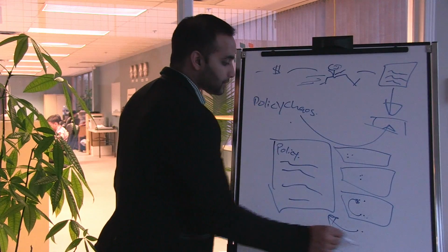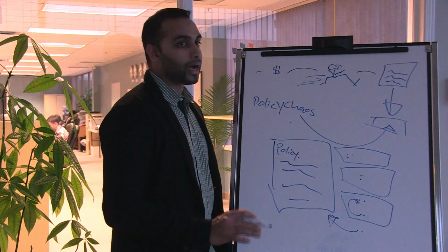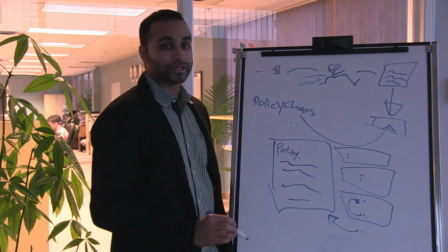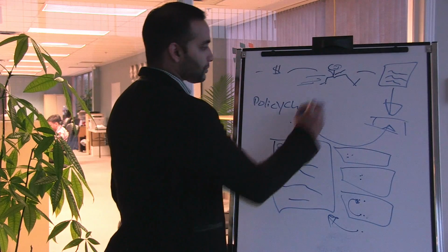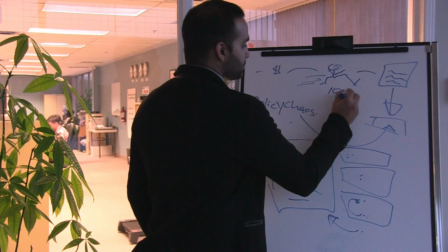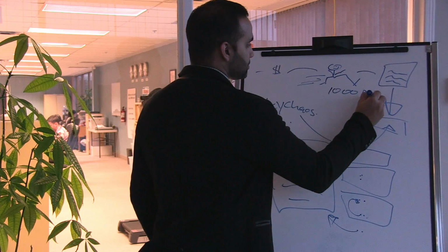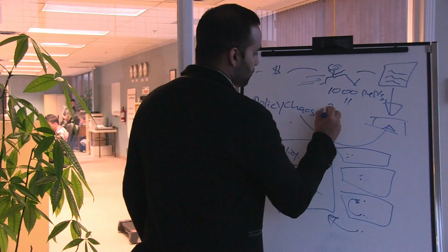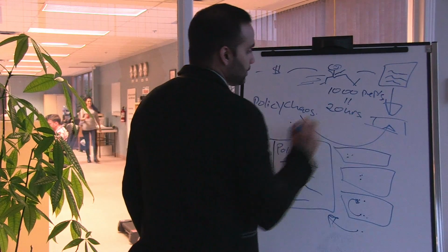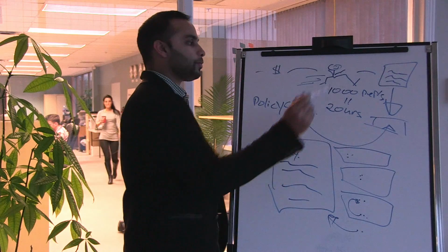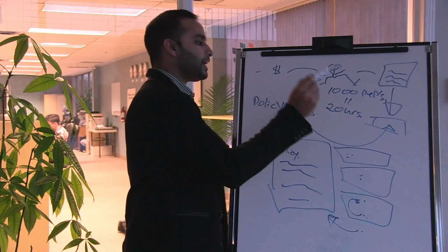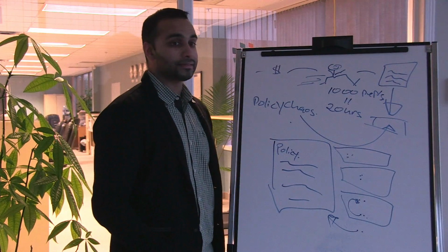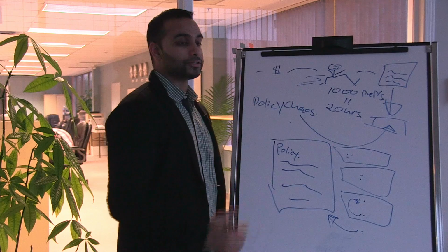Those are the must-dos. If you do this, you're going to get a huge ROI. You're going to get beautiful returns from a system like this. And probably the metric that I can give you is, I'll just write it up here, for every 1,000 policies and procedures you have, it's going to take you about 20 hours to enter it properly. I said it twice just for emphasis because that's a nice metric for you to have.